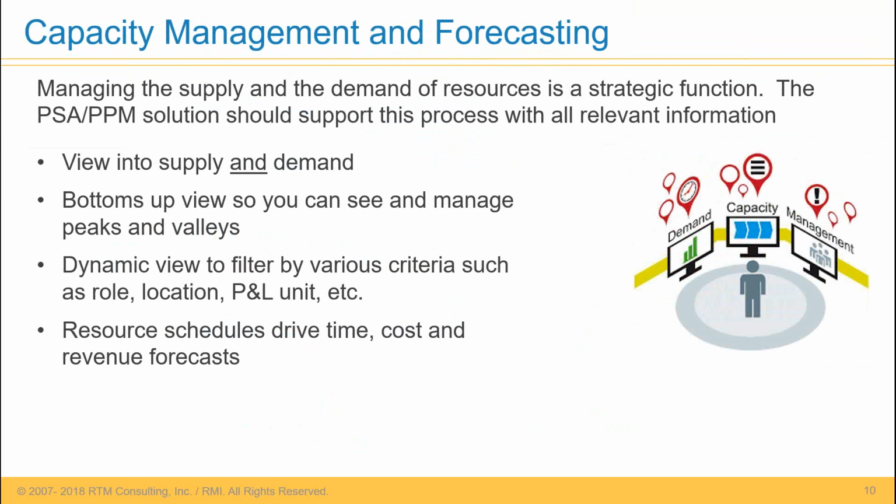All right, last but certainly not least is capacity management and forecasting. So thus far, what we've talked about is what I would call more tactical. It's been about searching for and assigning a specific resource or resources to a project. Capacity management is much more broad and more strategic. This is about looking at the organization either in its entirety or by certain segments, for example, by region or by practice, in some cases, perhaps even by role. And the idea here is I should be able to see both my supply and my demand.